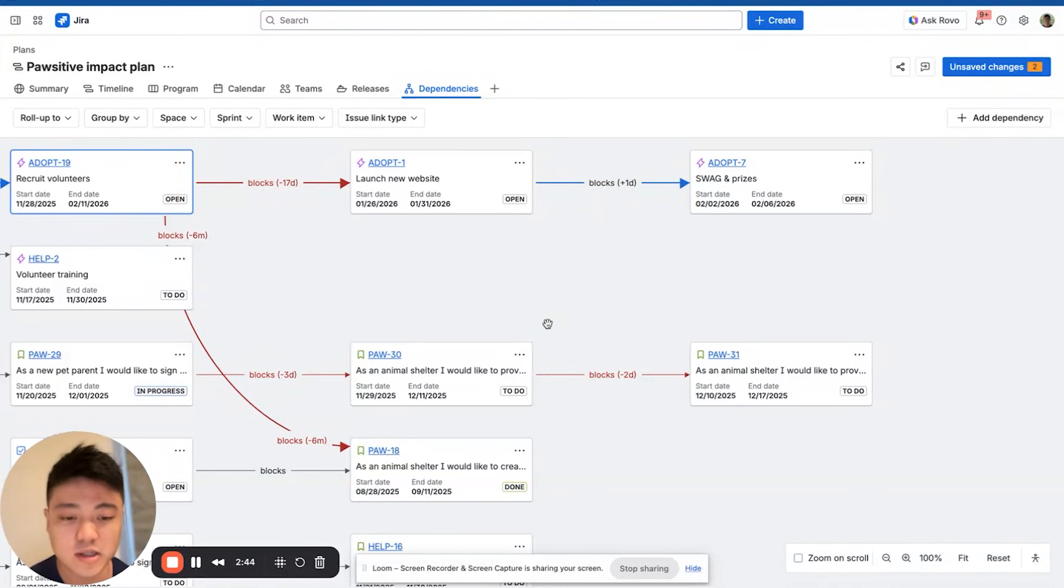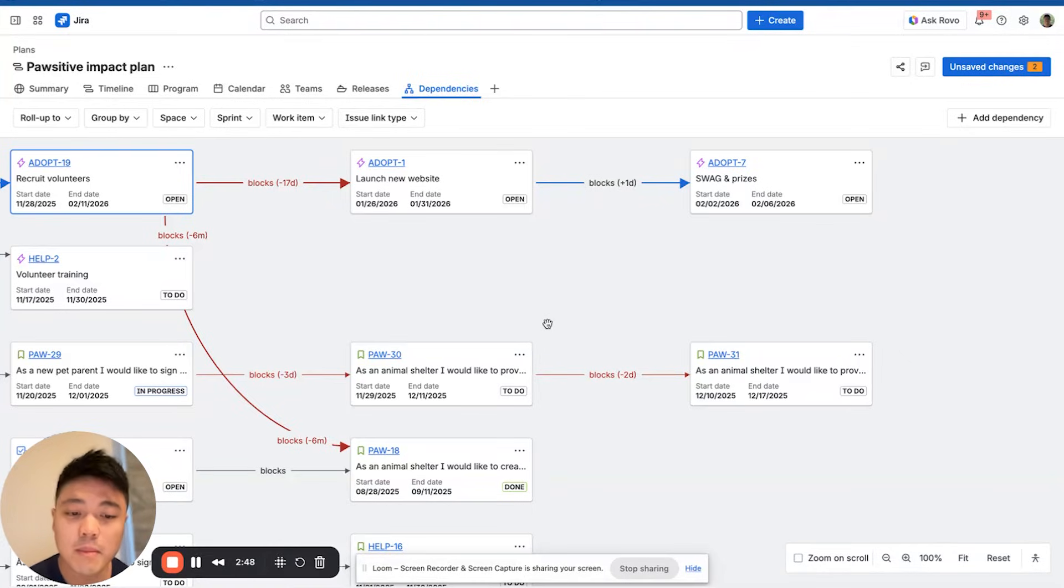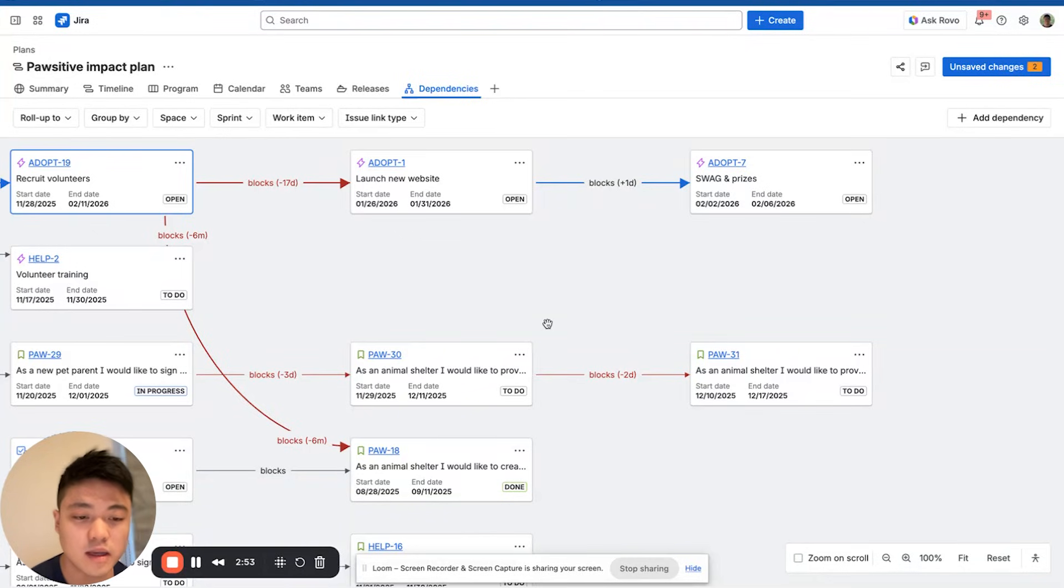Or the press release can't be sent until legal has approved the messaging. By mapping these dependencies in Jira Plans, you can see exactly where delays might occur and coordinate with other teams to keep everything on track.